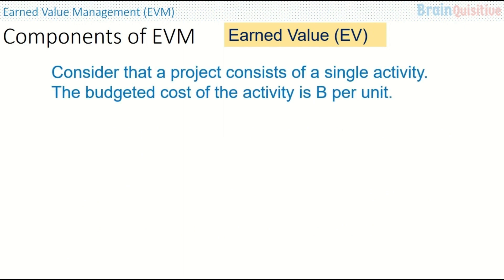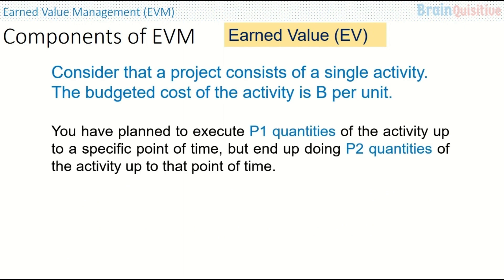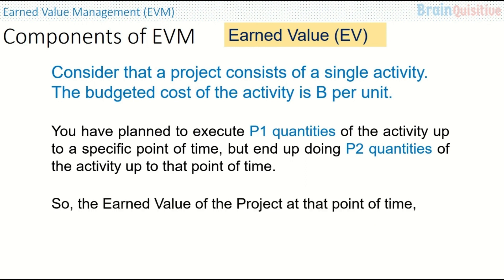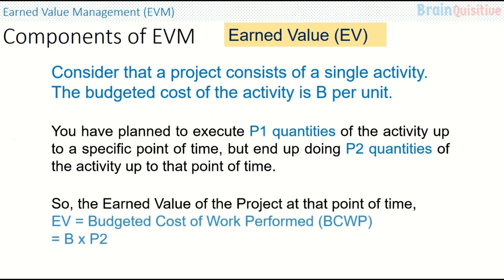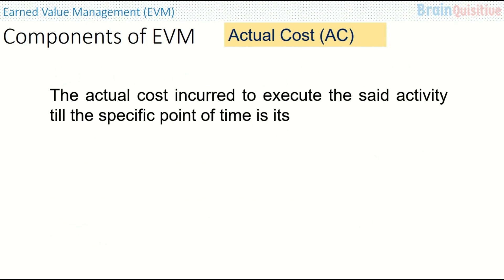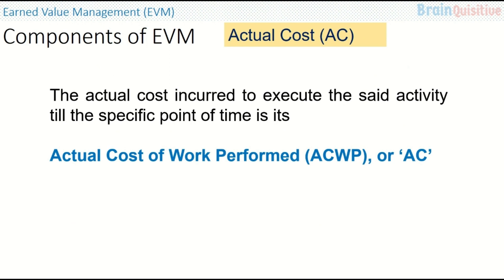Next is earned value. For the same project, if you have planned to execute P1 quantities but end up doing P2 quantities of that activity, then the earned value is EV — the Budgeted Cost of Work Performed, or BCWP — which equals B multiplied by P2, where B is the budgeted cost and P2 is the actual quantity done. Note that B is the budgeted cost and not the actual cost. The actual cost incurred to execute the activity up to that time is called the Actual Cost of Work Performed, or ACWP, also written as AC.